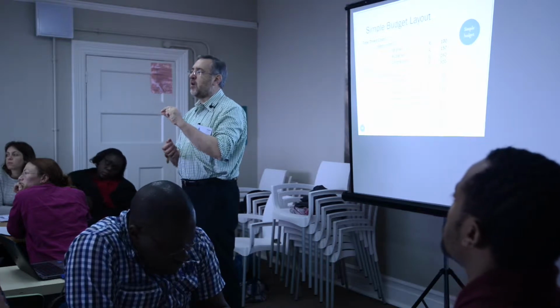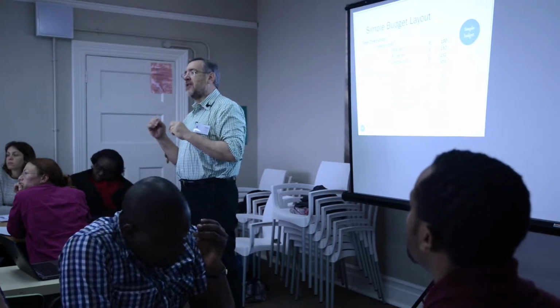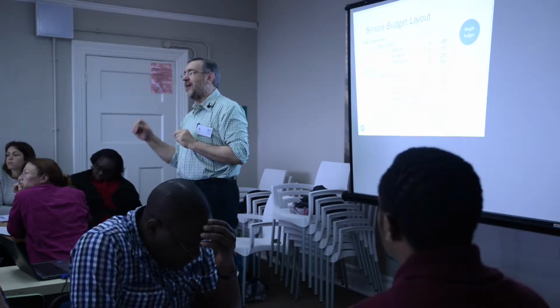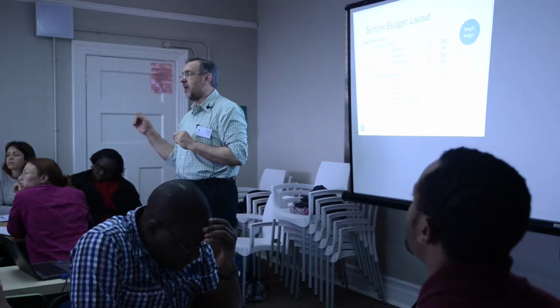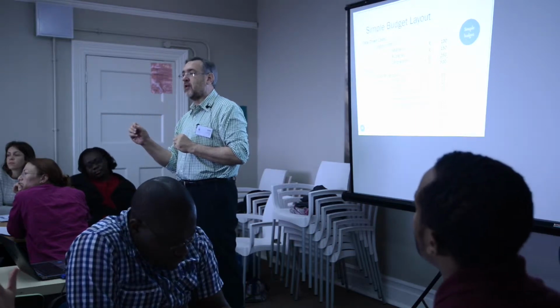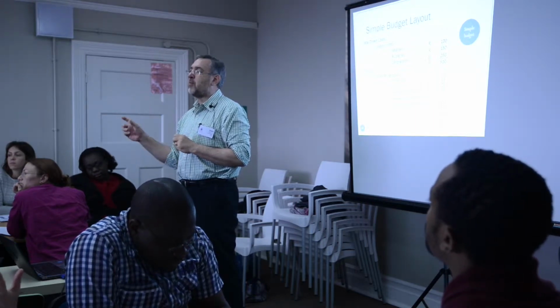So I think if you are getting other funding for the project, then you need to put that down. I would never say it's for free. I would say there's an in-kind contribution to this, because as I was saying, I don't think anything comes for free. There's always a cost. You might not know what the cost is, but rather put it in as an in-kind contribution.